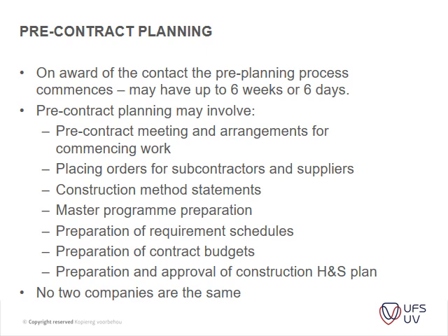Okay, your pre-contract planning usually begins on award of the contract. The pre-contract planning process commences. It may take up to 6 weeks or 6 days, depending on how quickly the client wants the contractor on site. The pre-contract planning may involve the pre-contract meeting and arrangements for commencing work, placing orders for subcontractors and suppliers, construction method statements, the master program, preparation of the required schedules, preparation of the contract budgets, and the preparation and approval of the construction health and safety plan.